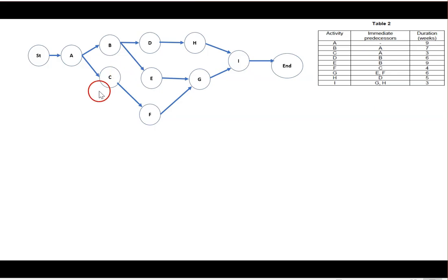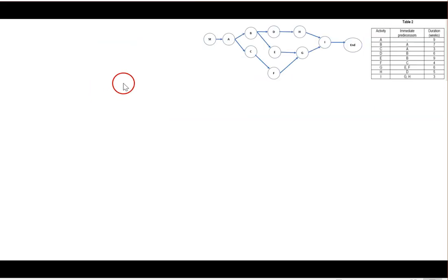Now we're going to do the network diagram, which is based on our sketch. You can do round shape or rectangular, but Umi prefers rectangular, easier to fill in the numbers and very clear to calculate later. We have start here, and start must have 0. We will do the EST first, in which we fill up the top part first. Then later we go backwards and do the late times.